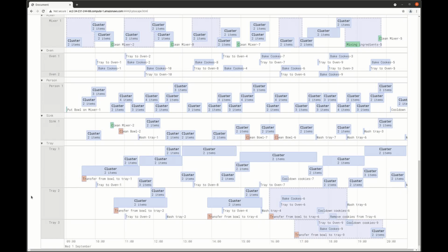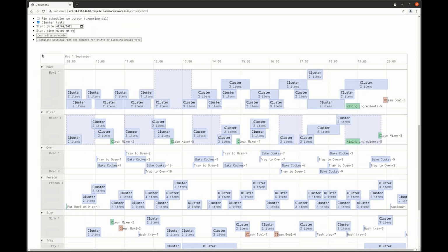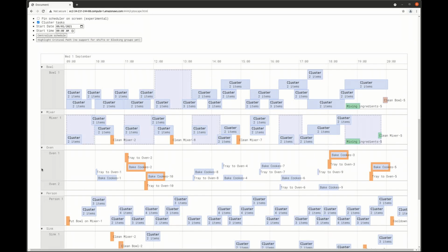Okay, so from the results here, we can see that extra ovens don't actually help all that much. The second oven isn't very well utilized, and additionally, only one of the tasks is actually on the critical path. Since ovens are relatively expensive and time-consuming to install, investing in an extra oven wouldn't actually help us make cookies much faster, so therefore that probably isn't something that we want to consider. This is especially useful in the life sciences, where liquid handlers and mass spectrometers make ovens look cheap and simple to install.